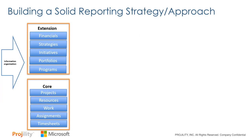A lot of organizations we work with, as we mentioned, want to do program reporting, and they may want to have metrics at a program level that aggregate data from the projects below that. Well, we need to plan and set that up as we're deploying our PPM system. Some organizations want to do portfolio management and just roll up all the projects, or do more strategic top-down portfolio management. And sometimes it's a one-to-many or a one-to-one. You need to think through that and plan on it. Organizations we work with that do a lot of iterative or agile work often map in terms of iterations, but also initiatives and top-line epics that are going to drive the business forward. You want to plan and manage around that. Also, business strategies and goals. Do we want to map around that and have that as an extension of our reporting?